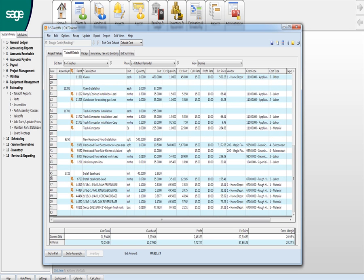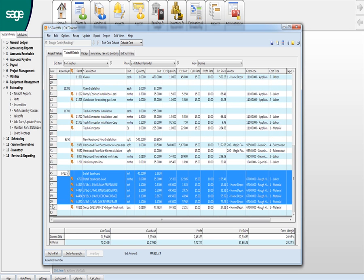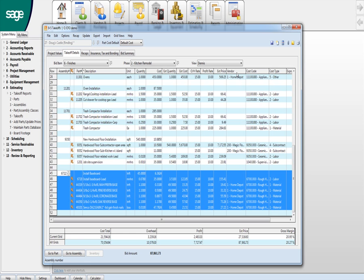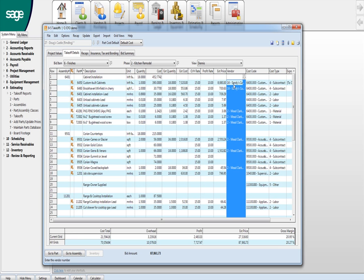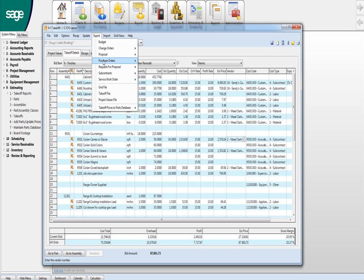If I don't have this on this job, I come in here just like I do, you probably use an Excel. I come in here and delete that because I'm not going to do that. Over here, you might've noticed as I was going through and the vendor column, who am I going to buy these from? These are coming from Sandy's cabinets. All these items here are coming from Mead. And the reason that's important at this point is I can come up here and say export and create a purchase order for this job for those items and send that PO right to Sandy's cabinets.